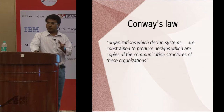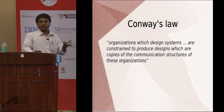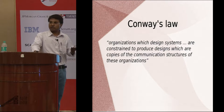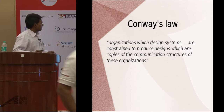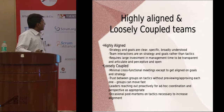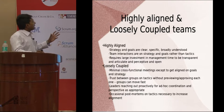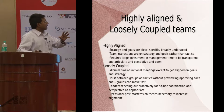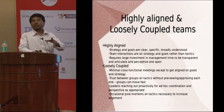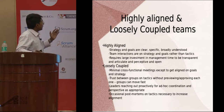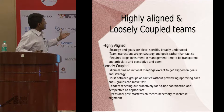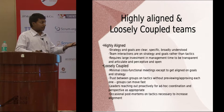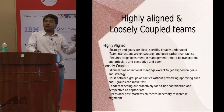Now we look at Conway's Law, which basically states that based upon how your organization is structured, that is how the system the organization designs will turn out to be — for example, three groups produce three layers in a three-tier architecture. In the Spotify model, you're looking at highly aligned and loosely coupled teams. Highly aligned means everybody is clear about the strategic goal and their role. Loosely coupled means fewer cross-functional meetings, less time interacting with other teams, and fewer dependencies.